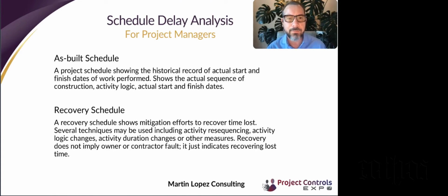We have more definitions. An as-built schedule, for example, versus a baseline or a monthly update. Most of you know what an as-built schedule is, but it is important to have a good as-built schedule with good actual dates, start dates and finish dates. Because when you come to the end of the project and you need the as-built schedule to assess a delay, you have something you can rely on as far as when things were completed. And you can also follow the sequence of how things were completed.